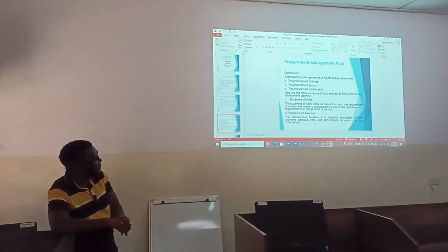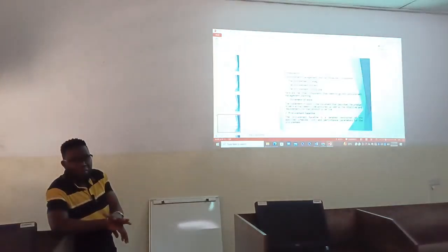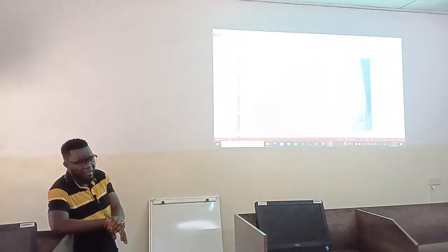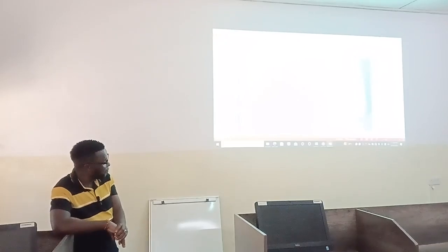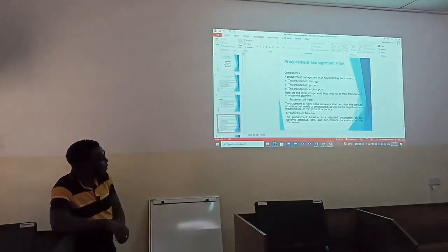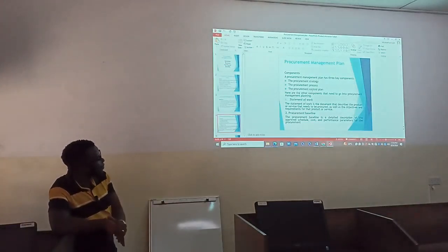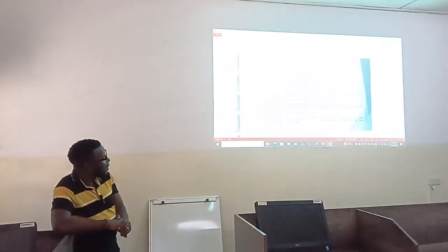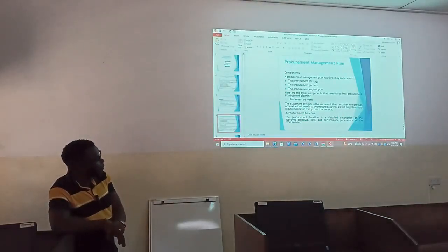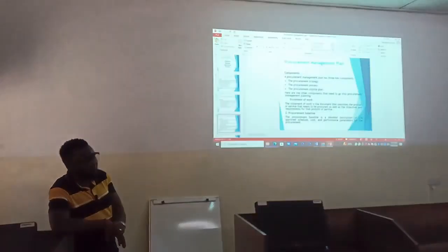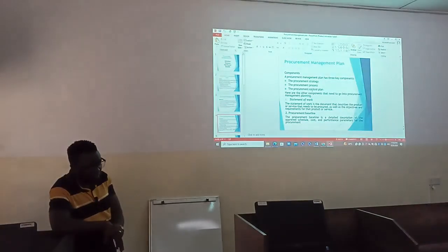Another component is what we call procurement baseline. So the question still comes, what is this procurement baseline? Basically it is a detailed description of the approved schedule, the cost, and of course the performance parameters and the indicators for the procurement.